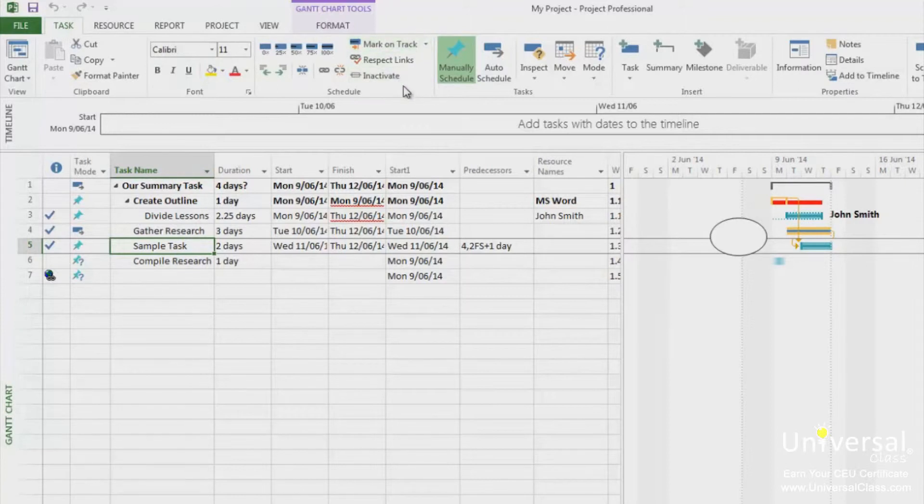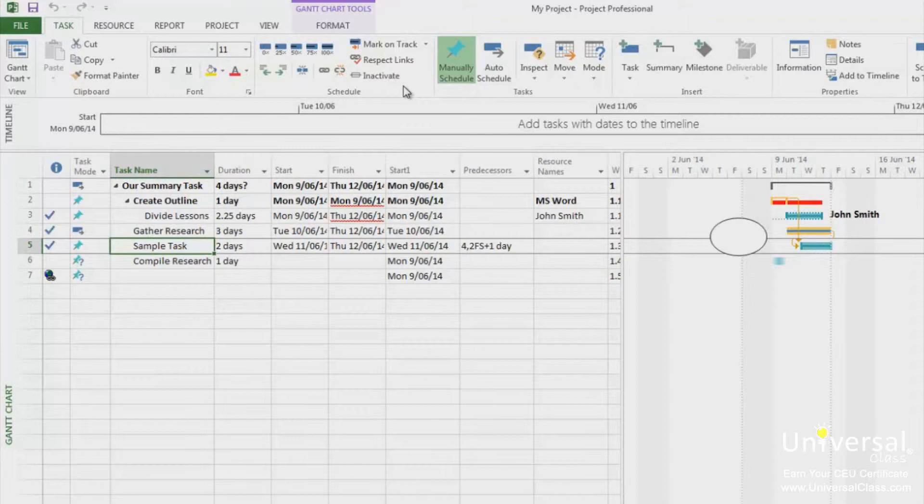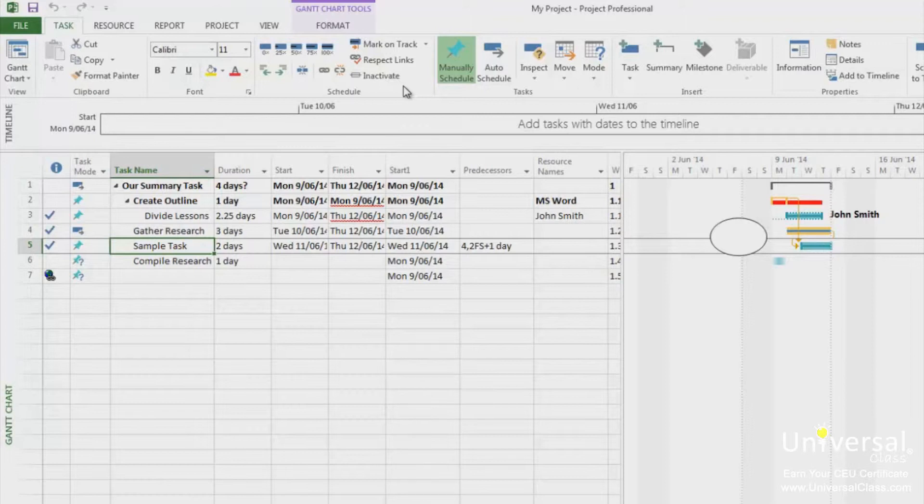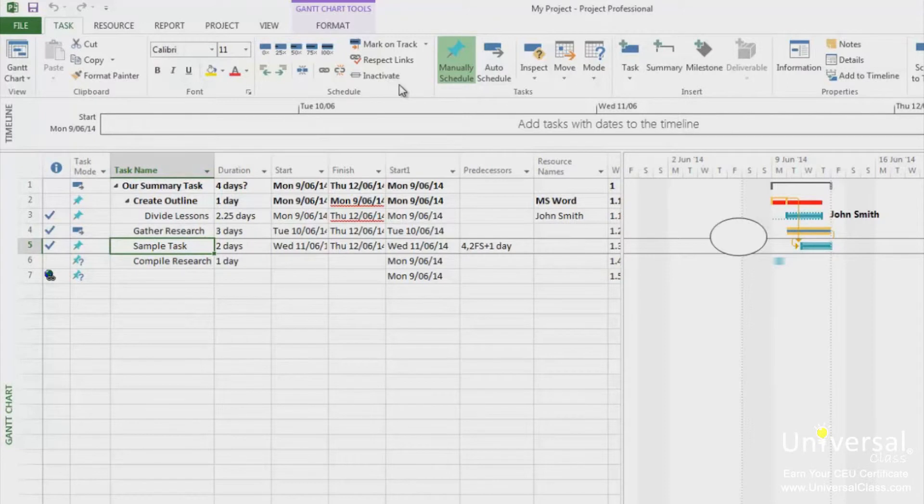If a task is complete, Project 2013 will automatically assume that the task was started and finished on time. However, if you're wanting to track progress, you'll want to enter the actual start and finish times for each task. To do this, go to either the Actual Start or Actual Finish in Tracking Gantt or Gantt Chart view with the tracking table displayed.